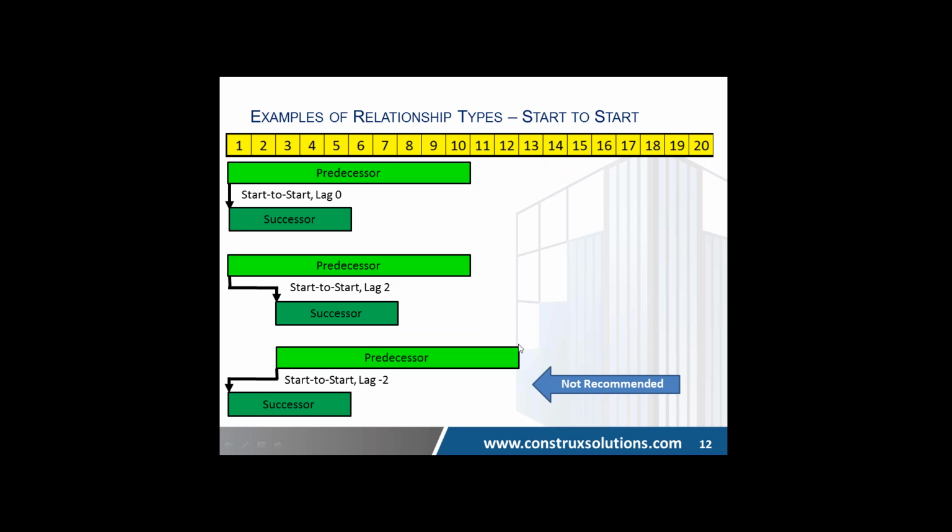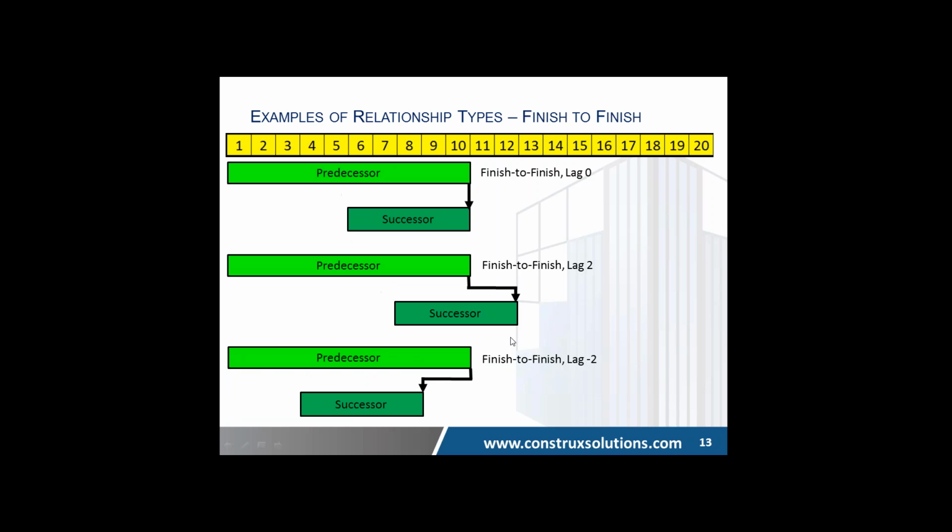I say that this is not recommended. Next is finish to finish. Very similar to start, as you can see. Finish to finish tie on the same day with a lag 0 basically says I'm going to finish these 2 activities at the same time.